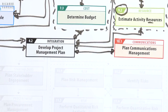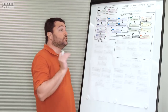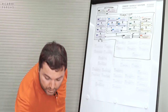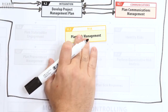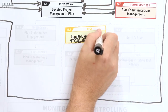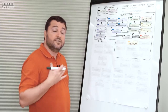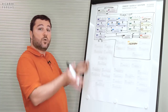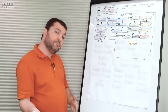Next is risk management — almost as big a knowledge area as scope and schedule — because risk is an intrinsic part of your project. The first thing is to plan risk management. The most relevant answer here is: what is your tolerance? For example, a bungee jump might be extremely risky for me but not for you. Tolerance defines what is and isn't a risk for your group and organization. Without knowing your tolerance, everything or nothing could be a risk.